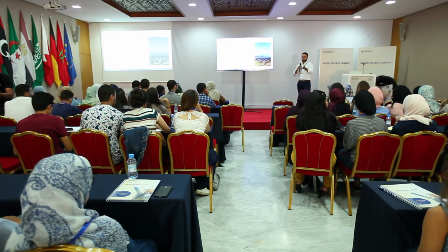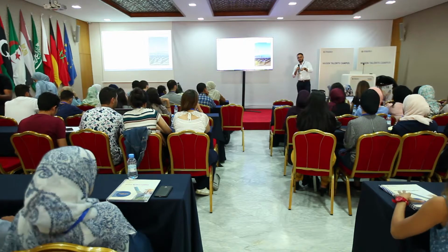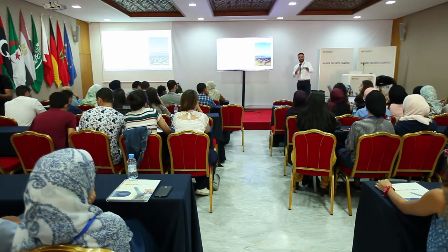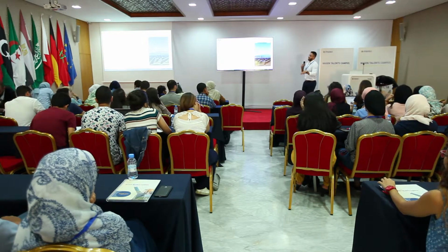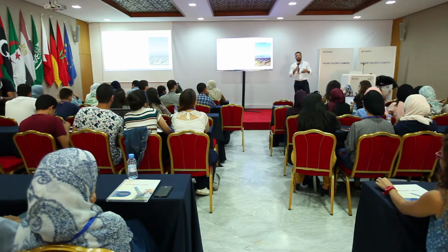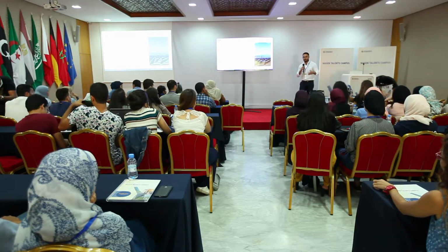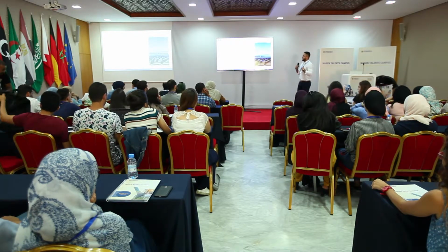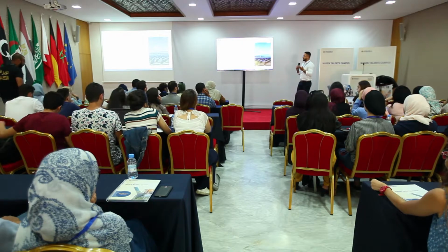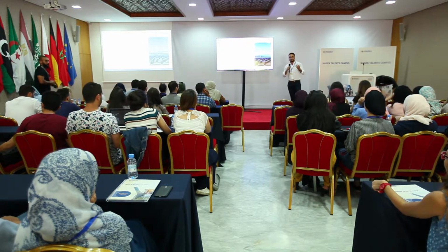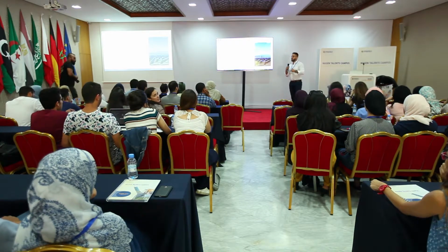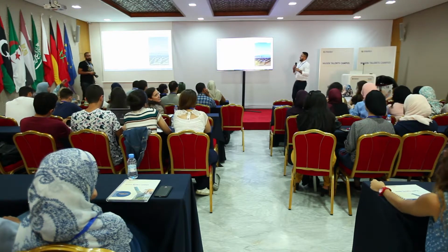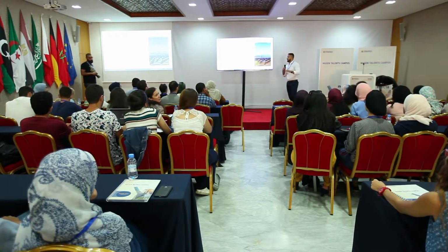Once it reached financial closure in June 2013, it was not until 3 years later that the construction happened. And finally, in February 2016, the king went there and said, NUR 1 is officially inaugurated. But for this very first plant in Morocco, it took 6 years, which you, as a normal user, don't see. But this is the ecosystem.